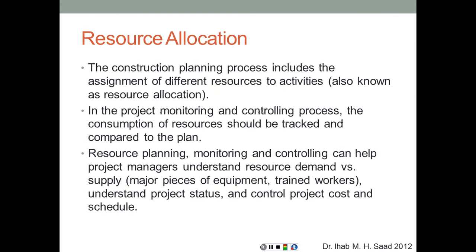Resource allocation means assigning different resources to different activities and assigning their costs to each activity. The construction planning process includes this assignment, also known as resource allocation. During monitoring and controlling, resource consumption is tracked and compared to the plan — for example, estimating 200 cubic yards of concrete but finding at the end that 210 cubic yards were actually needed, indicating waste or underestimation.